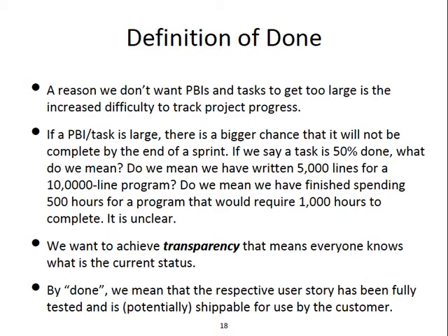Scrum makes sure that they have a very strict definition of done. When you say your task is done, it means it has to be tested, fully tested. If it's not tested, then it's almost meaningless to say that the task is done. And also because of that, they want to divide the task not so large.